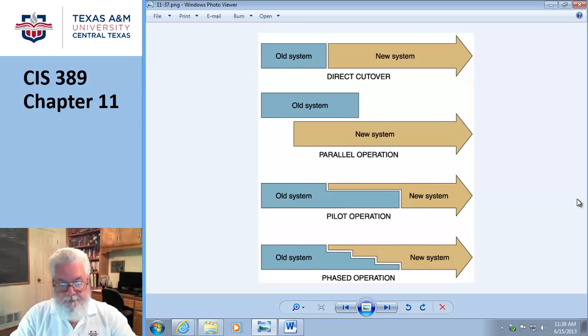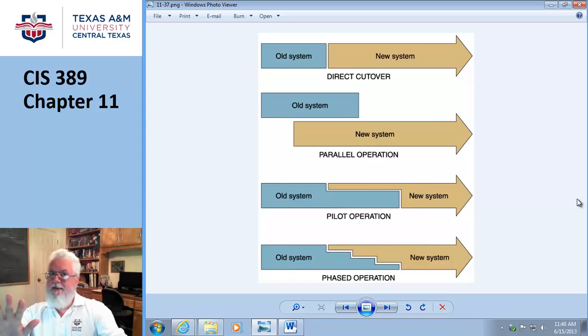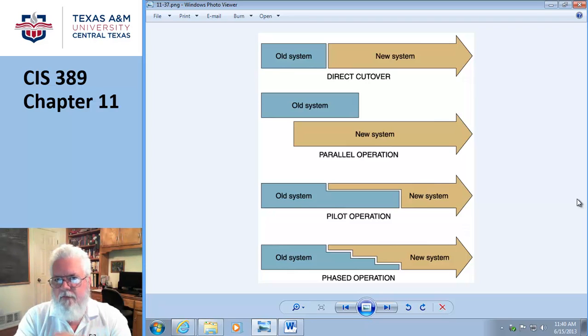And they'll tell you. And then on page 489, you have the final report. At the end of the SDLC, you're basically going to have this final report to management. It's going to have the final version of all the documentation, any planned enhancements that you've discovered along the way. Because this is a moving train, right? You put a system in, you think, okay, I'm done. Well, of course not. As soon as you put it in place, somebody's going to say, well, you should have included this feature. And you go, ooh. You don't necessarily implement that change right then and there, but you make a list. Make a list of enhancements and changes that people have asked or talked about.